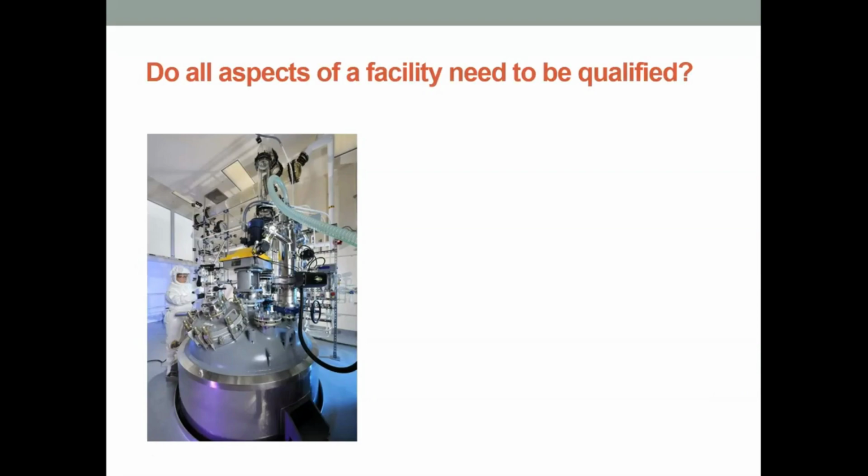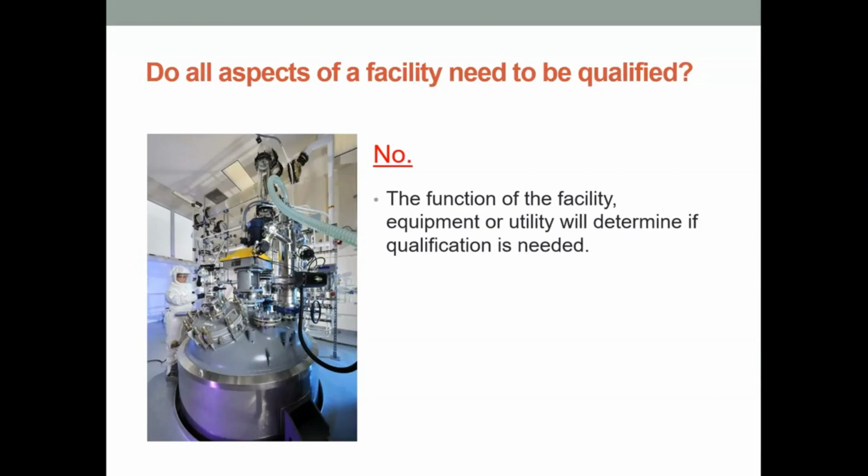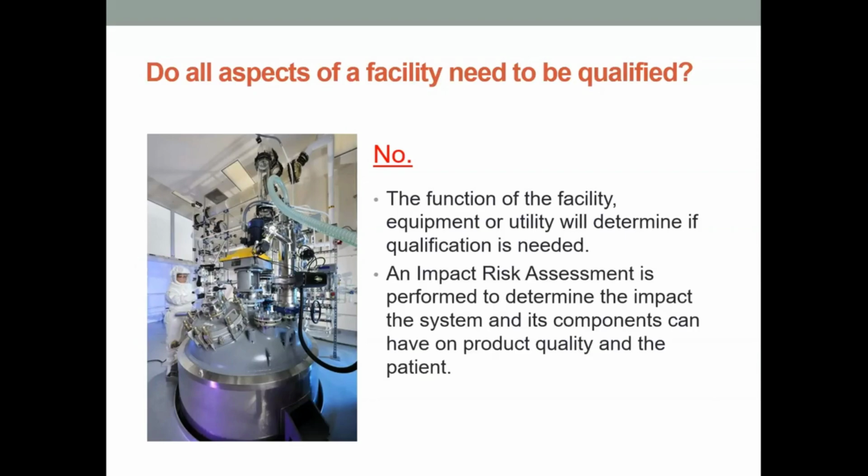Do all aspects of a facility need to be qualified? The answer to that is no. The function of the facility, equipment, or utility will determine if qualification is needed. An impact risk assessment is performed to determine the impact the system and its components can have on product quality and on the patient. This is performed during the design phase.